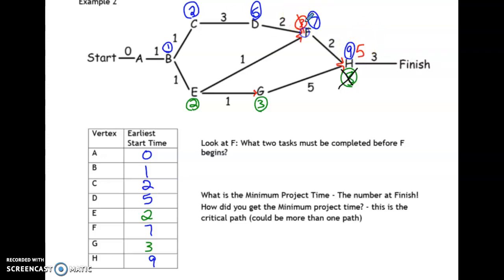So since the 3 was smaller than 7, the teachers' pages to develop only took 3 days, where the sports teams and the clubs were a little bit harder to find pictures of, that took longer. So we want to pick the bigger number, 7. And then down here again, if we did developing the teachers' photos and then getting them ready to print, that only took 5 days. We don't want to pick that number either. We want to pick the one that took the longest. Okay? All right, so now we're able to print and mail the pages, which is going to take 3 days. So this whole project, I want to pick that bigger number there, will take 12 days.